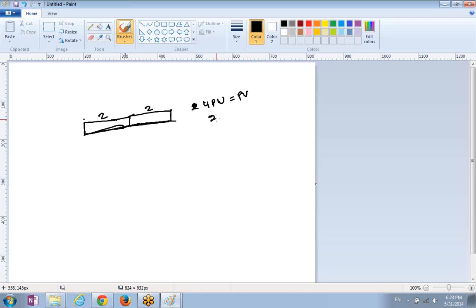So 2 person weeks is the actual cost. And how much we achieved? 75%. So 75% of PV is 3 person weeks. 3 person weeks is EV. Right? So CPI is 3 upon 2 is equal to 1.5. Right.